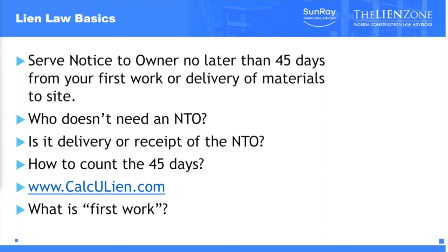You can serve a notice to owner no later than 45 days from your first work or delivery of materials. So the question is, how early can you send it? Well, you can send it as early as the day you have a contract.